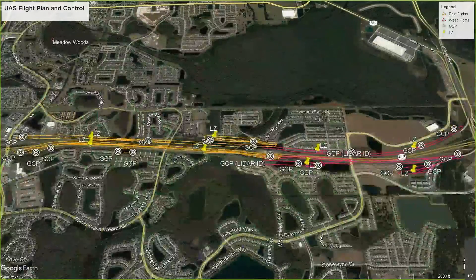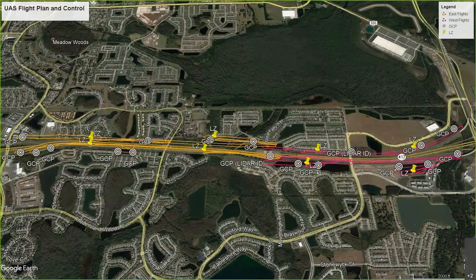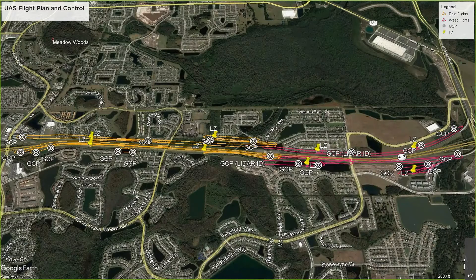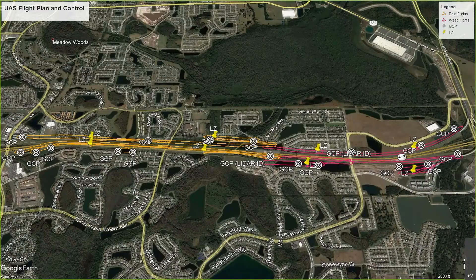The operations plan showed our landing and takeoff zones for each drone LiDAR flight, ensuring we stayed about 30 to 40 feet outside the roadway surface. Because of the swath and angle of the LiDAR unit, we still had all the coverage we needed even while staying off the pavement. This planning allowed us to fly four and a half miles — roughly 100 acres of off-pavement information — in a total of just two days.